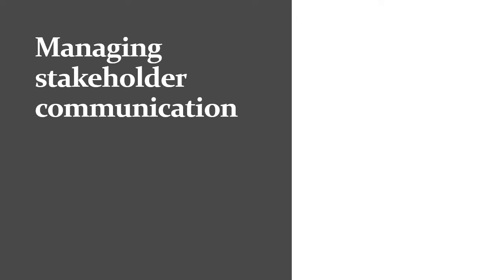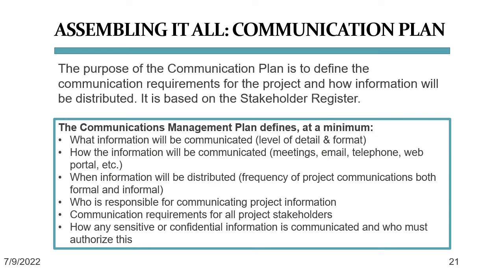Now that you have a pretty good idea of how to improve your communication, we need to talk more about the what, who, why, when, where, and how of this communication. That's what a communication plan is for. You organize all of the project's communication information in the project communication plan. The purpose of the communication plan is to define the communication requirements for the project and how information will be distributed. It is based on the stakeholder register.